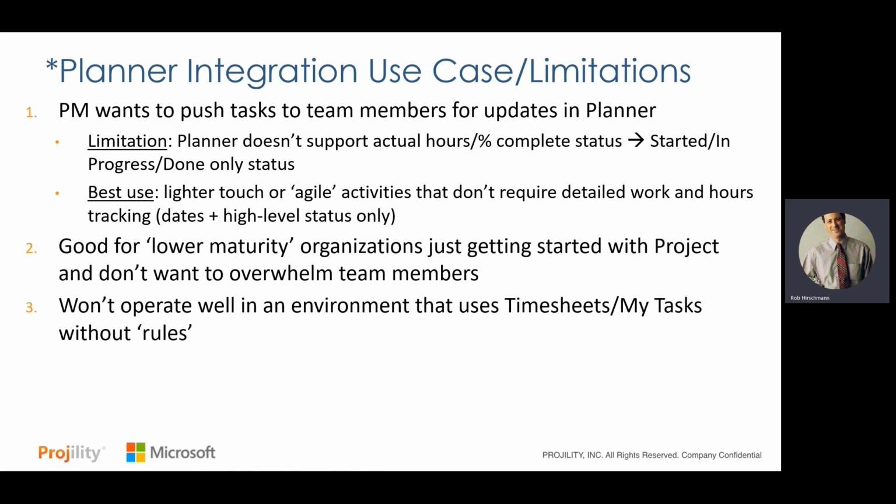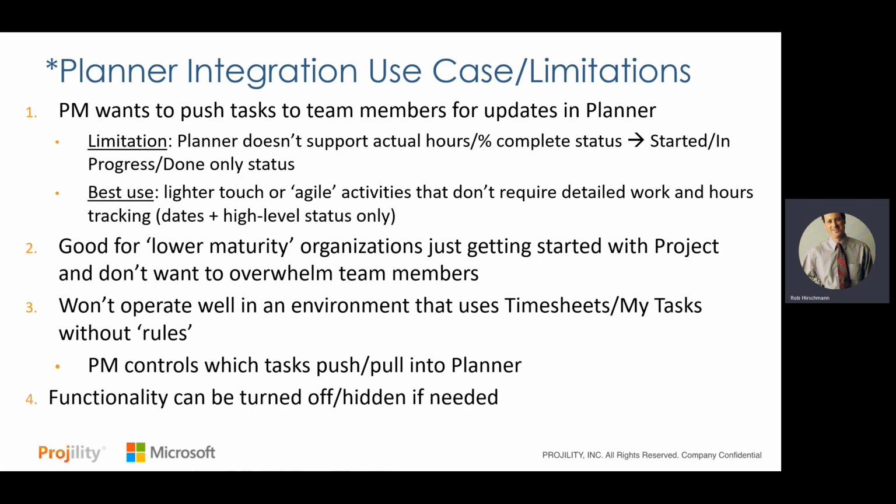It does not operate in an environment where you're doing timesheets or My Task tracking in Project Online without putting some kind of rules and governance around it, because it will come in and it will update your task progress. So again, is this component important to you? It may or may not be. Remembering that the project manager in each case controls what tasks get pushed and pulled, versus PWA where we can set that up with a different hierarchy and different approvals.